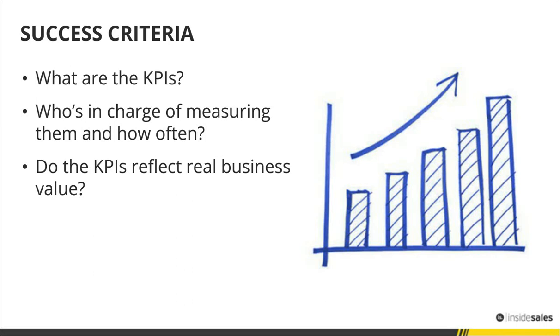And you need to really come together and identify that, and you need to have a process in place to continually discuss these success criteria. You don't want to end up in a situation where you integrate technology, you let it run for 6 weeks, and at the end of the 6 weeks is the only time you're evaluating it. You're going to have some unhappy people in that room if in 6 weeks they're first learning about some of the changes in the data.